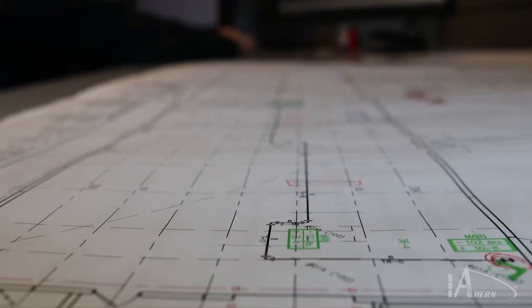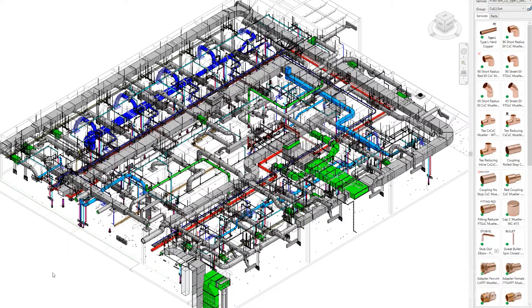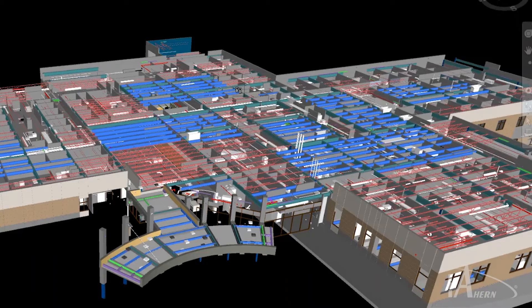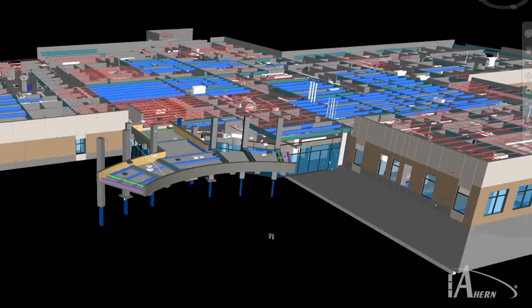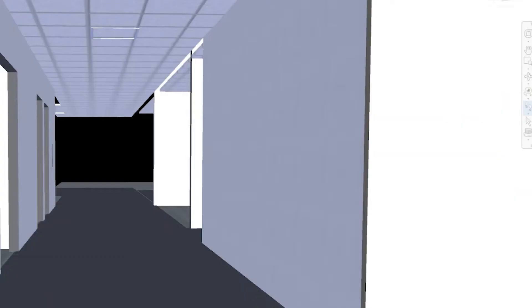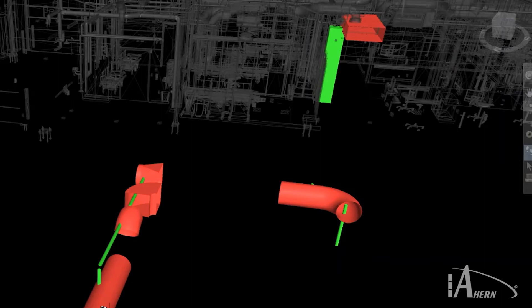After we complete the modeling stage, we then proceed into the coordination phase, which entails ensuring that all the components or elements do not intersect or collide with any other trades. This is most often done through secondary software usage, which allows you to navigate freely throughout the facility, drop in at any portion of the building, and perform clash detection.